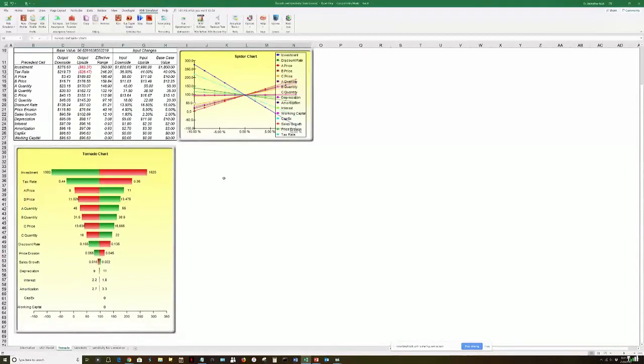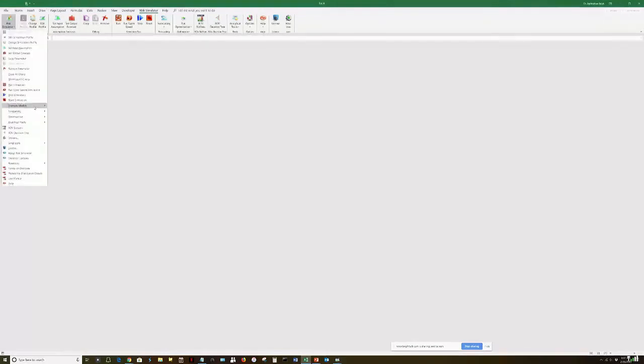In fact, the critical one was, guess what? The price of the land, the insurance, and the development, and so forth. That completely changed the whole discussion around to say, we're no longer going to talk about price of steel, because we just proved that it was relatively irrelevant in this case, right? So you can actually have a very interesting type of conversation around some of these methodologies.